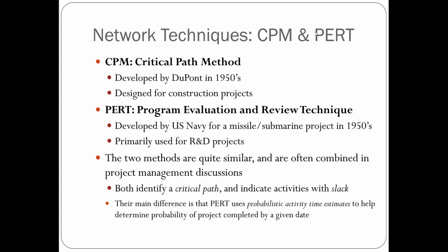The 2 methods are quite similar, and in fact, the PERT method built on the CPM, and they are also combined in the project management discussions. They both identify a critical path and also indicate activities with the slacks, which means activities that you can delay.